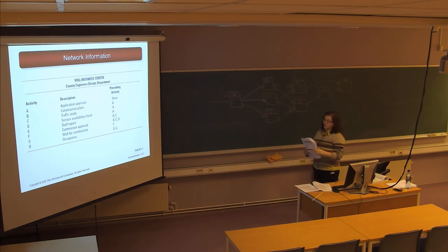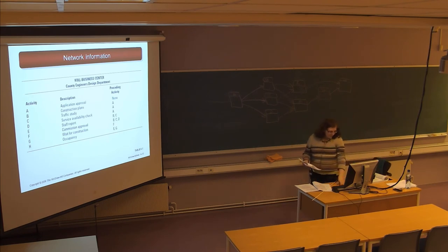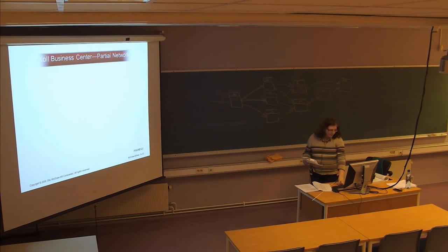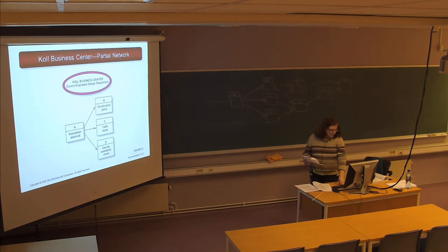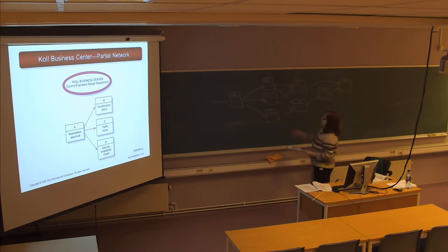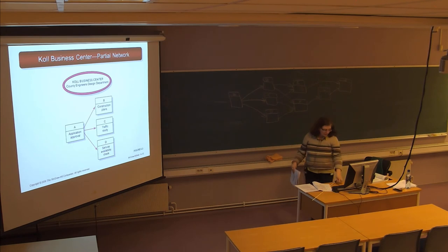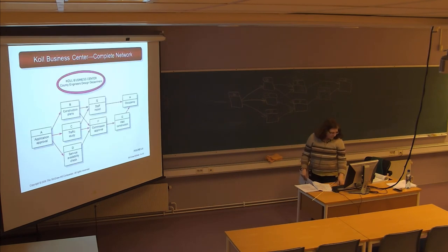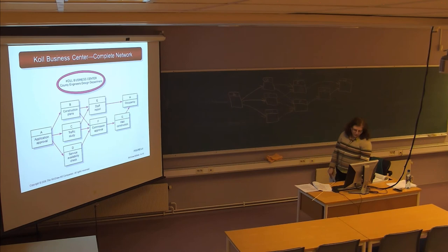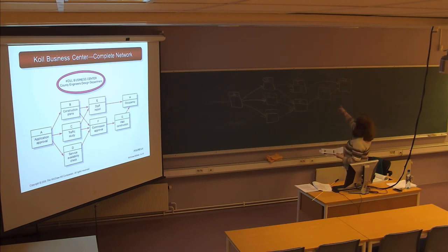So we drew the network based on the description of activities and their preceding activities. You can see this is a partial network showing that B, C, and D are preceded by A, and the complete network matches what we've drawn here.